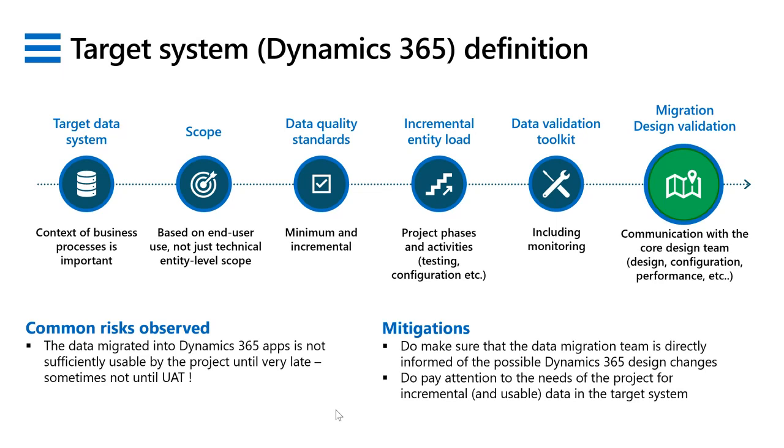Very often we see data migration progress reported as, we've got 500,000 records here, they've got 700 attributes, and we are bringing over 89% of the attributes over into the target system. People pat themselves on the back, but that is not meaningful if that data is not usable at the other end, right? You need to look at your progress very much in terms of usability of that data that's landed at the other end, not just a technical movement from A to B.